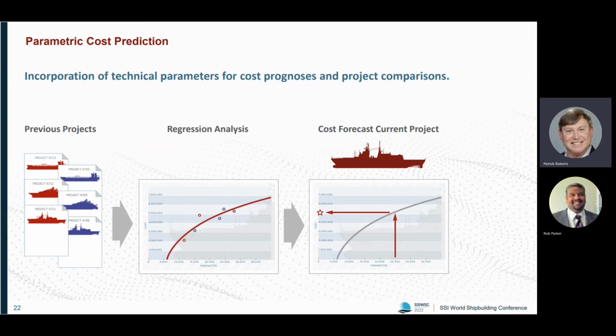That works by analyzing existing projects, which we either calculated or estimated in CostFact, or initially uploaded into CostFact from Excel spreadsheets. The idea, I think, is very clear for everybody who's working in the shipbuilding industry. We have different systems or different parts of the vessels, and for all of them, we can define main cost drivers. So here in this example, it's about the cost of the propulsion system, and then probably the required propulsion power will be a main cost driver for the resulting cost of the propulsion system.